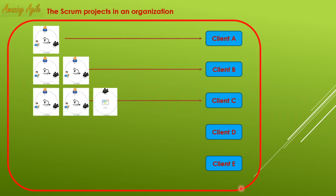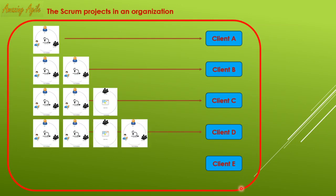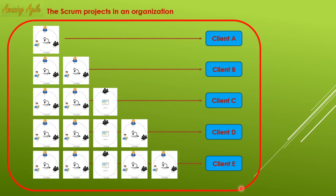Client C has three projects — two scrum and one Kanban — which is manageable, similar to client B. In the case of client D, there are four projects, roughly forty people at least, and two or three scrum masters and product owners. Managing this is a little difficult because of coordination across four different projects with four different timelines, so you have to be extra careful. For client E with five projects and more than fifty people, you have to do something — otherwise it is difficult to manage.